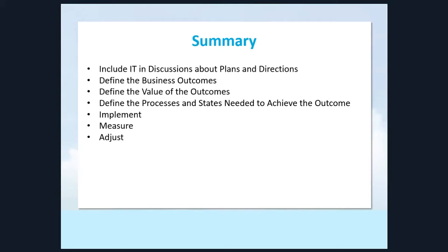We have to implement a plan. So once we've agreed upon it, we have to go ahead and implement it. We can't keep breaking the plan up and stopping halfway unless there's a true failure in the plan, because you have to start, implement, measure. And measurement should be empirical as much as we can. We want clarity of, by this date, we will have X things done, not a feeling of around or about, or we should be X% done.